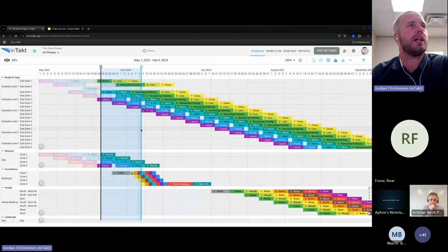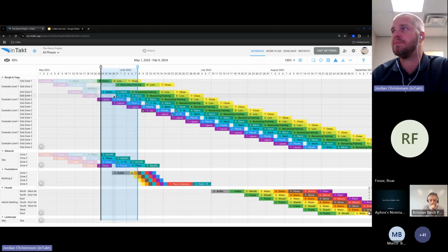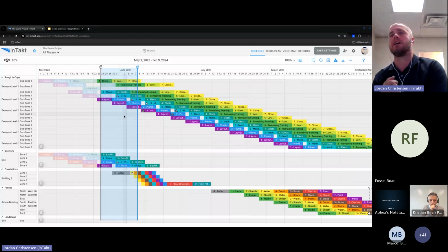A couple of things that I didn't talk to you about in the screenshots is actually our lock line. You can consider this lock line as a data date in a typical CPM schedule. And then this is kind of your look ahead line. So you can move this around, play around with that. But the lock tap progress, as you update each one of these tasks, it will move all the succeeding tasks right off the bat. You know, no recalculating. It's going to do it for you right away. And then you can lock that progress right here with this button, and then that will just progress that lock line.